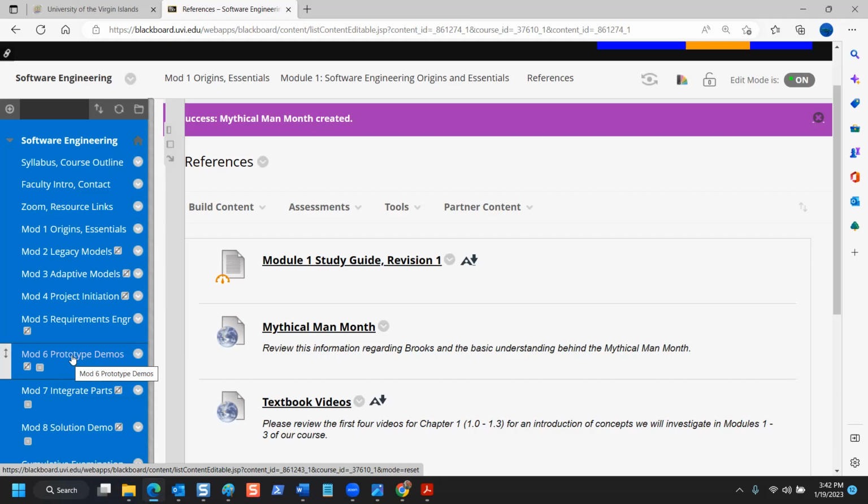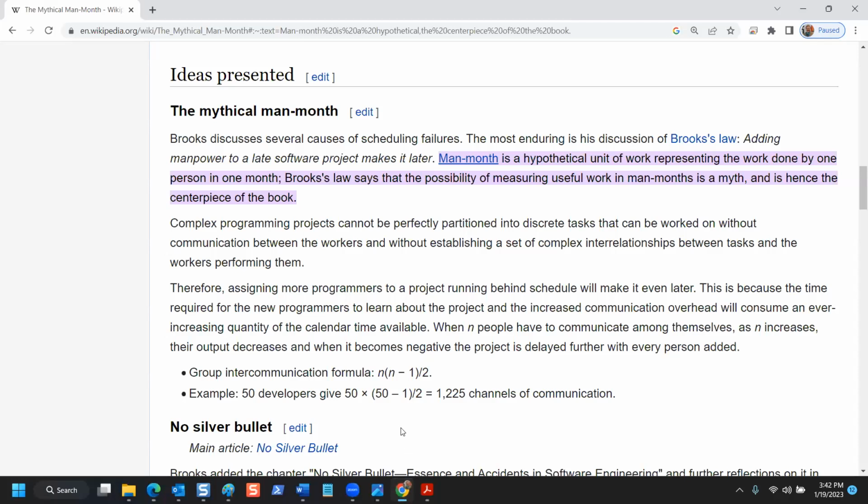And here's the problem. Guess what the team does for the next 2 weeks with those 3 new teammates? Guess. Would you care to guess? Dr. Brooks became famous for this. He basically studied this exhaustively, and then he published about it because people kept hurting themselves. For the next 2 weeks, the original team spent all their time getting the 3 new hires up to speed where they could even help at all.